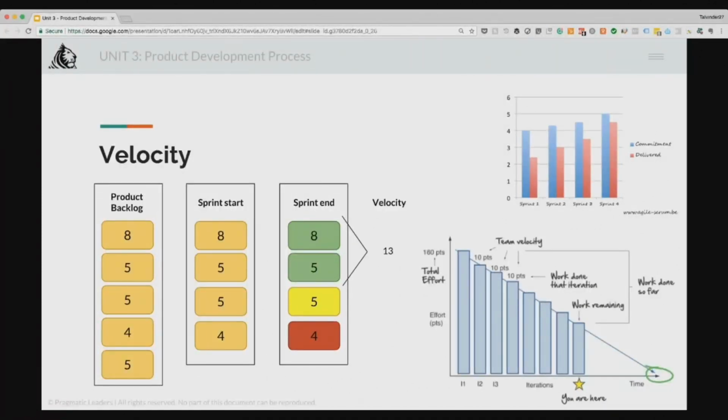After 3 sprints you have just done 200 units of work, which basically means you are doing about 60-70 hours of work, right? 60-70 units of work is what you are doing per sprint. So you are way behind the 100 initial estimate, correct? So it won't be done in 5 weeks. It will be done in about 7 to 8 weeks, 7 to 8 sprints, correct? And this is the meaning. This is the reason why velocity is so important to understand and implement.